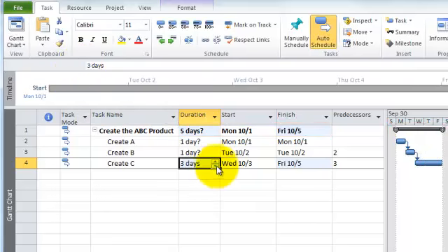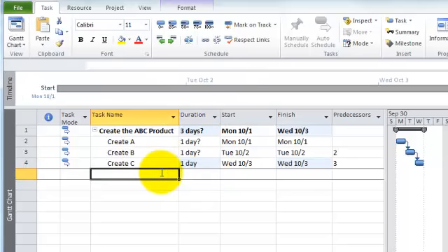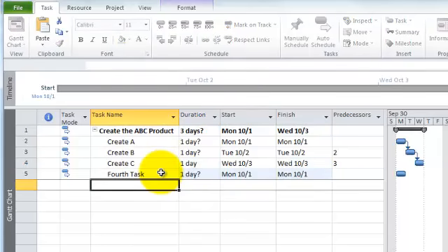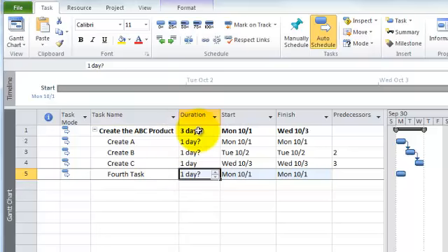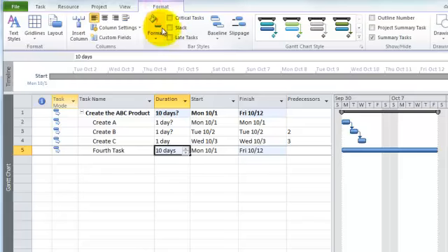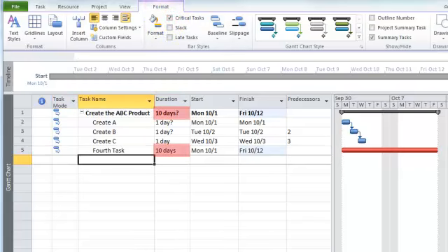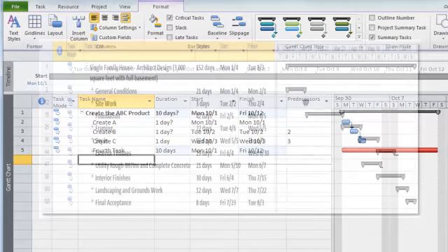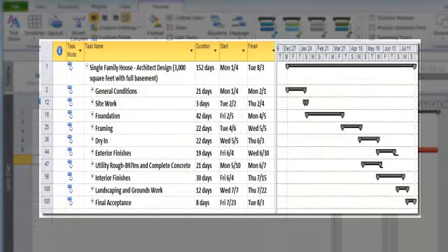And if I add a 4th task and turn on the critical path formatting and make that 4th task the driver with a longer duration, let's say 10 days, then the summary task reflects the change in the duration for the group. Now in this simple example that does not seem like much, but in a very large project, summary rows provide very important high-level scheduling information. As you might now perceive, this can be very important executive management level information that, for example, could be shared in a printout of a Gantt chart in a report.